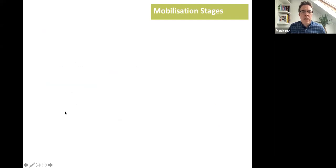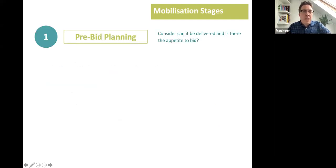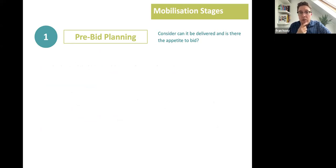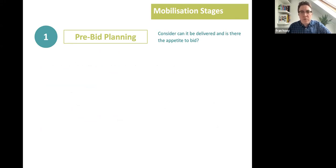Here's a quick flavor of the key mobilization or implementation stages. First, pre-bid planning: you bring in different parties to understand whether you can actually deliver the program — is there an appetite to bid? You'll go through pre-qualification, but there should be some planning around whether you can implement in the timescales, whether you have the capacity and resources, and whether you have the appetite to invest in advance of winning. The bigger the contract, the bigger the risk. You also need a flavor from the commissioner as to whether there'll be any contractual restrictions that may challenge that.